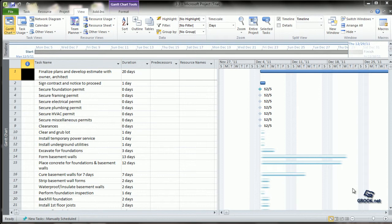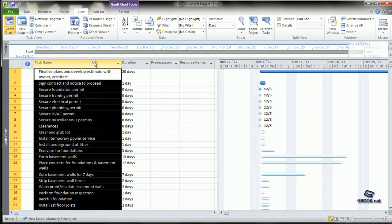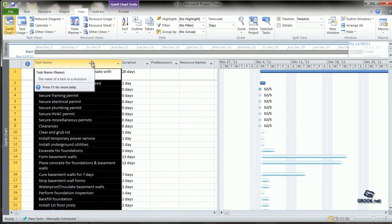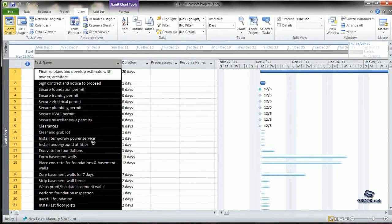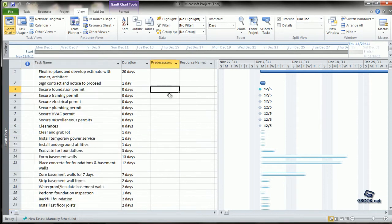To begin with, we had created a file which has all the task names and all the duration. Let us say we want to create phases or summary tasks for these. Phases is basically dividing these tasks into groups so that it is easier to monitor.